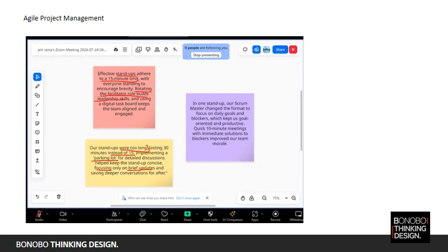And the Scrum Master is another important role there. The Scrum Master acts as a facilitator for the team, ensuring that Scrum practices are followed. They help remove any bottlenecks the project team may face, and protect it from external distractors, including facilitating Scrum ceremonies like the daily stand-up, sprint planning, and retrospective. That's part of the Scrum Master's role there.